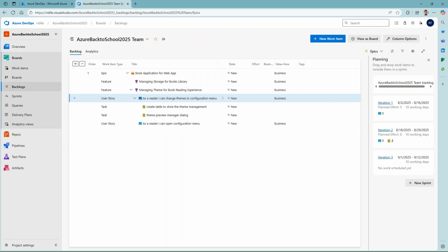We already did two steps. The first step is giving the planning attributes such as estimations, risks, and also the priority. And the second step, we put the user stories into the iterations. The rule of thumb is you should create iterations with the same time box, same planned effort, and do a historical velocity measurement based on your team. The third step is to measure the progress of the user story. How to do that?